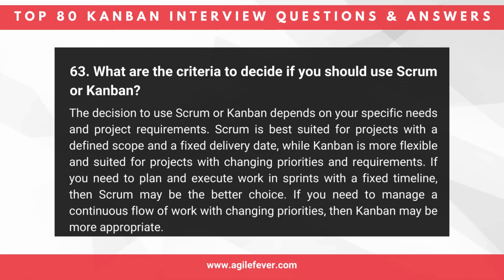Question 63. What are the criteria to decide if you should use Scrum or Kanban? The decision to use Scrum or Kanban depends on your specific needs and project requirements. Scrum is best suited for projects with a defined scope and a fixed delivery date, while Kanban is more flexible and suited for projects with changing priorities and requirements. If you need to plan and execute work in sprints with a fixed timeline, then Scrum may be the better choice. If you need to manage a continuous flow of work with changing priorities, then Kanban may be more appropriate.